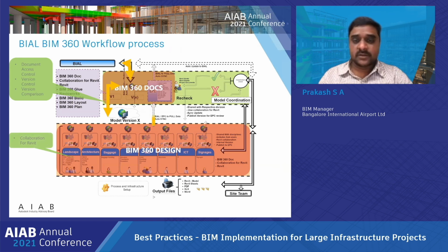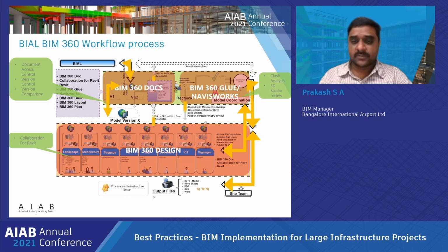And once the work is done in the Revit and synchronized, it pulls the data to the cloud, in the BIAL. Once the data is pulled, we can run the clashes, and if there are any clashes, they come back to the source files. We can rectify all the clashes, and once synchronized, it goes to the cloud again.